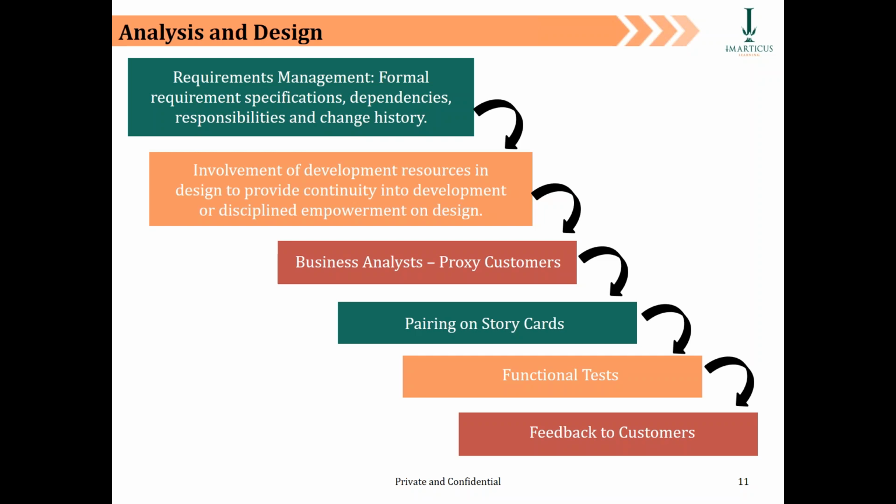When we gather the story points, we effectively convert them into a unit, either man hours or man days. So let's say your tester says, I think 20 man hours is what we need. If we are all talking about man hours, I'll say, okay, 20 story points maybe. Then your configurator says 15, your programmer says 17, and somebody else says, I remember something very similar, I've done it in 25 points. So what you do is you take an average of all these data points, and that becomes the estimate for your story point.